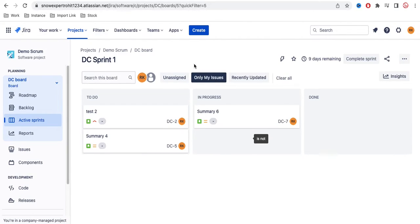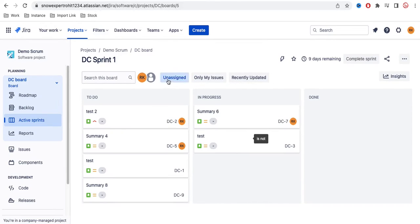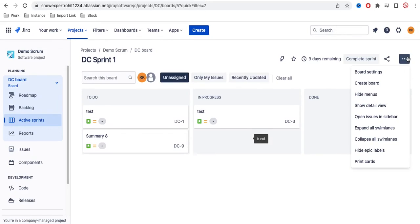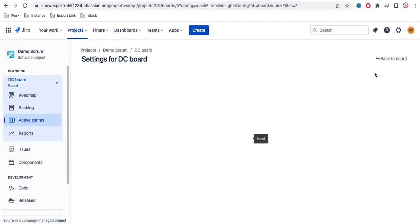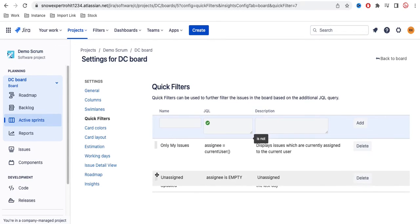Now, how can you rearrange their order? You can see Unassigned is showing first. For that, again you can go to Board Settings. Under Board Settings you have Quick Filter, and you can rearrange this order.